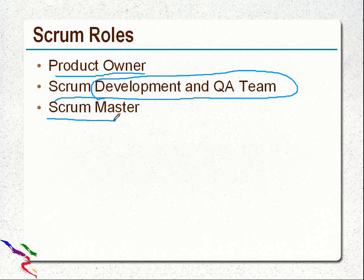The important role is that of the Scrum Master. The Scrum Master is responsible for making sure the team is as productive as possible. The Scrum Master does this by helping the team use the Scrum processes properly and by removing all the hurdles and impediments that come in the progress of the sprint. The Scrum Master also protects the team from outside environmental influences.